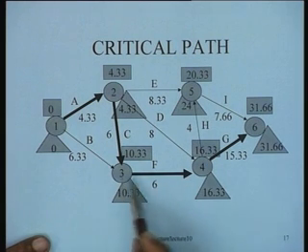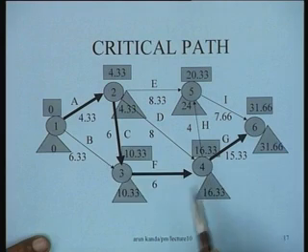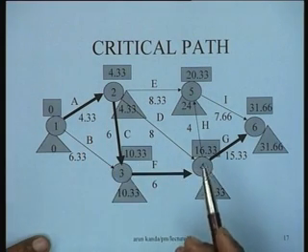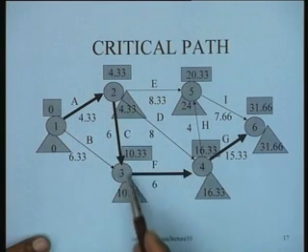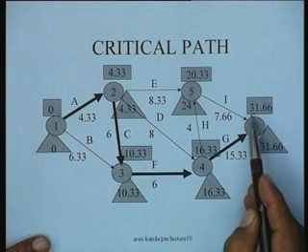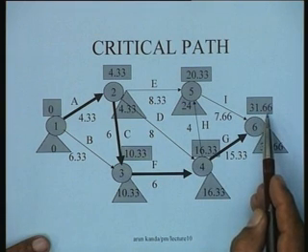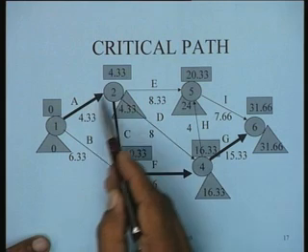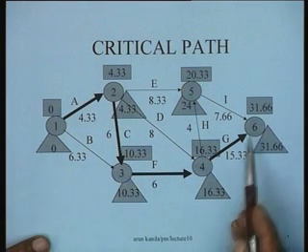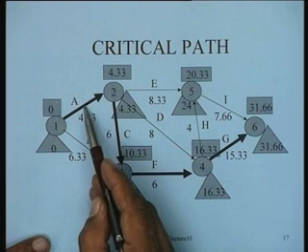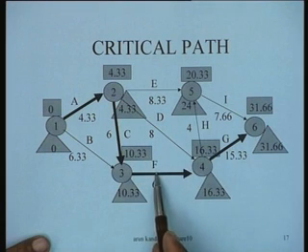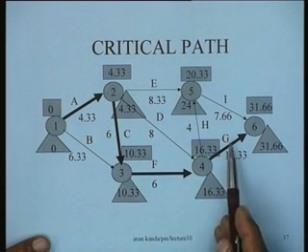So in this particular situation, what you find is that the activities are... now the assumption that is made in PERT is that once you identify the critical path in this fashion, the critical path has a mean duration of 31.66. The critical path is the sum of the durations of the activities lying on the critical path. And what we do is we now take into account the variances of these individual activities A, C, F and G. We had computed their variances.